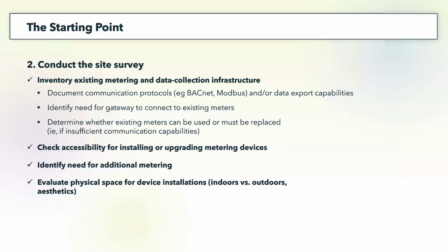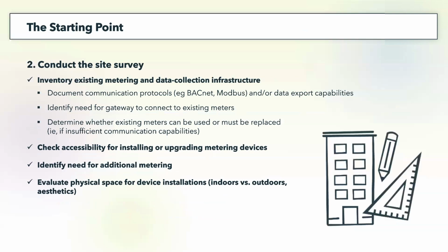Now, the starting point. So we need to know where we're at. We know where we're headed. We need to know where we're at. And this is what the site survey is about. So documenting what you have in place and its capabilities, right? Do we have meters? Which are the protocols that they speak? Is it BACnet or Modbus? Maybe they already have data export capabilities? Do we need a gateway to connect these meters to EnergyCap SmartAnalytics, right?